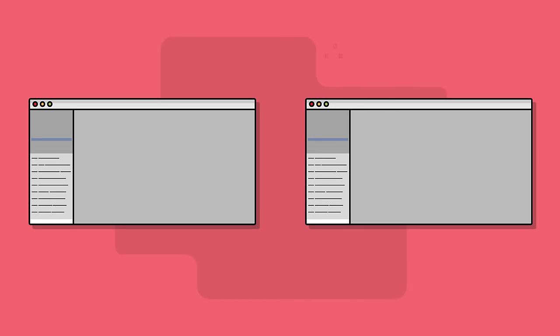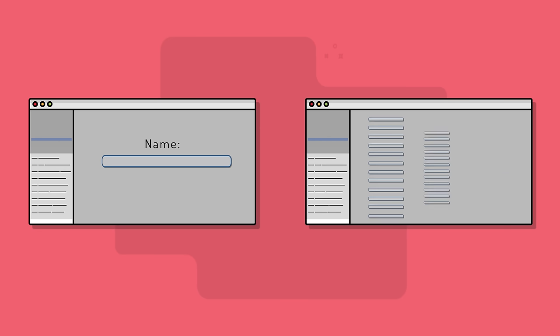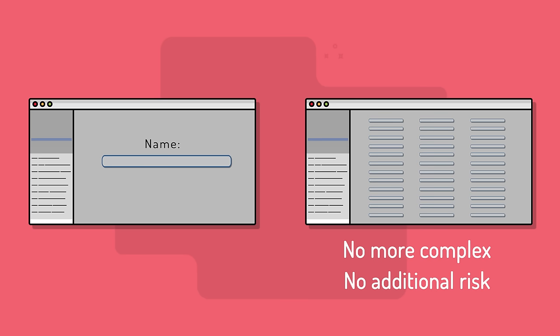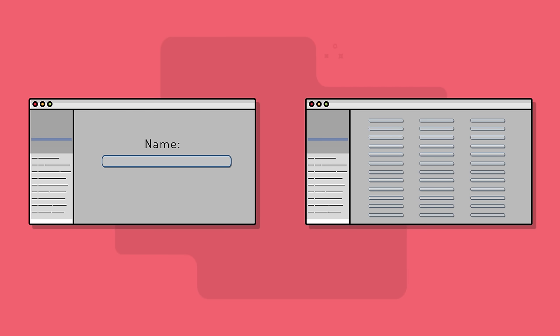First, the amount of work. Certainly, if there is more to do with something, the estimate of effort should be larger. Consider the case of developing two web pages. The first page has only one field and a label asking to enter a name. The second page has 100 fields, also to be simply filled with a bit of text. Despite having more fields, the second page is no more complex — there are no interactions among the fields, and there is no additional risk. The only difference is that there is more to do on the second page, so it should be given more story points.